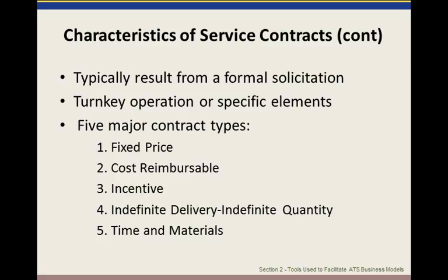We also saw some examples where the service contract allowed the FLMA to contract service a little bit if perhaps it was a new service and demand wasn't quite what it was expected to be. One of the things that we also looked at was how incentives were used in service contracts. I think the NPS thought that might be a good option to explore. We did see some examples, not too many, but for example, one contract would reward the contractor if they operated without any accidents for a period of time. Others were rewarded when they minimized their breakdowns or out-of-service vehicles, that type of thing.